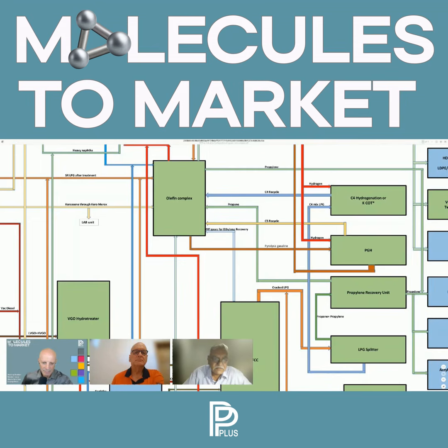If the accuracy level by whoever is doing this feasibility is not guaranteed to this level, the proposal itself does not go to the board. So the board will seek a confirmation that whatever is the investment which is envisaged, it is of the order of plus minus 30%. So that means I have to study the plant to sufficient detail. I have to work out sufficient quantities in the plant so that I can put a cost against it.